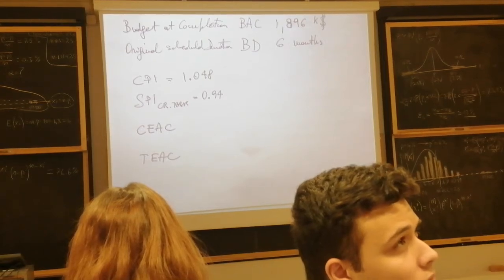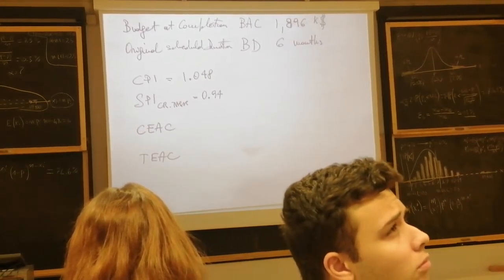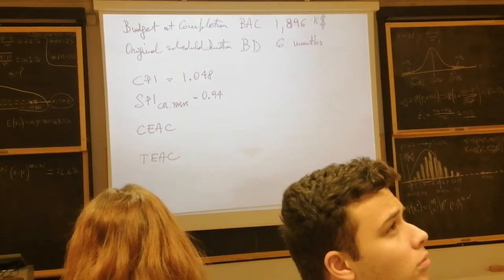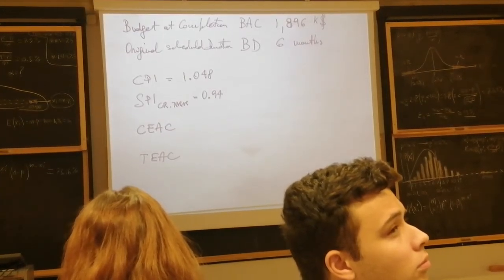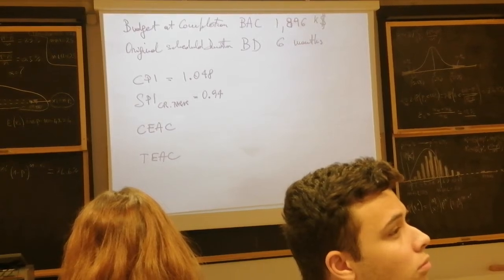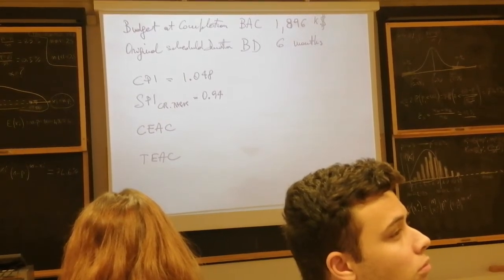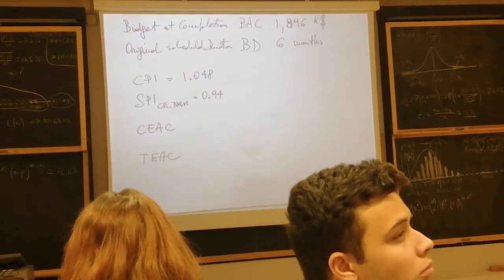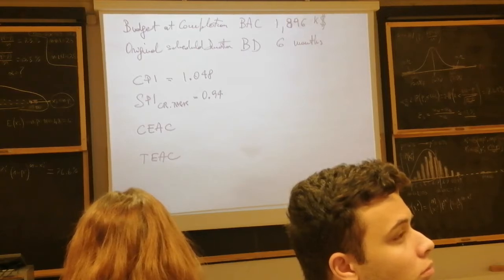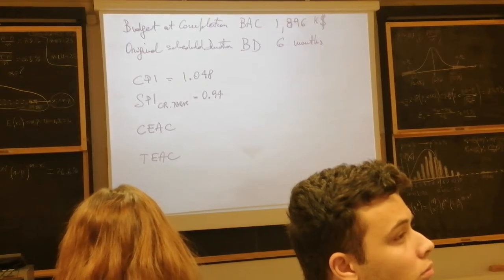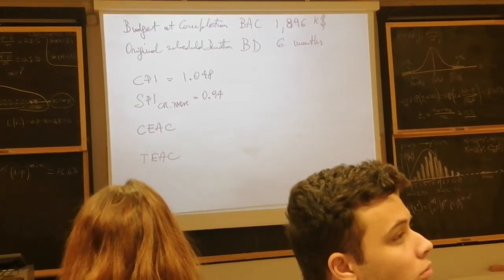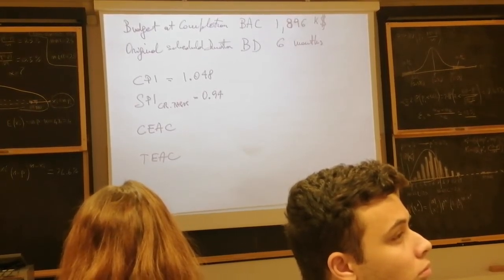You think that performance in the past will replicate and be a good predictor of future performance. This is called a revised approach. It's a good approach. We revise our deadline in a revised approach, which is conservative. What we did in the past is going to be applied to the future. So past performance is a predictor of future performance, straight linear.